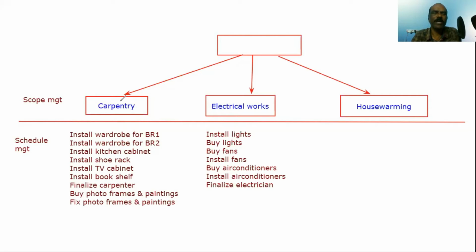But of course, normally we restrict it to around 15, 20 milestones. If you go too much, it's very difficult to monitor. But normally, at a high level for senior management, we fix only 15 to 20. Of course, at a project team level, you may have more milestones, but to the senior management, we normally fix around 15, 20 milestones. So the difference with activity: normally an activity will have a duration, right?